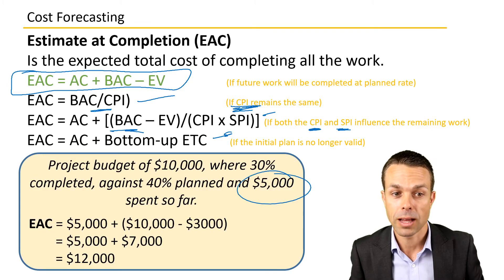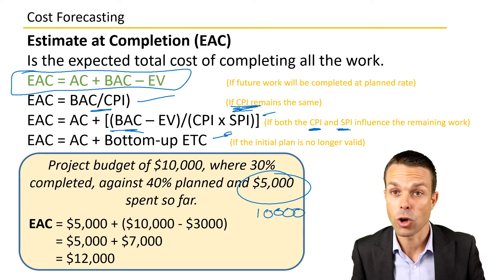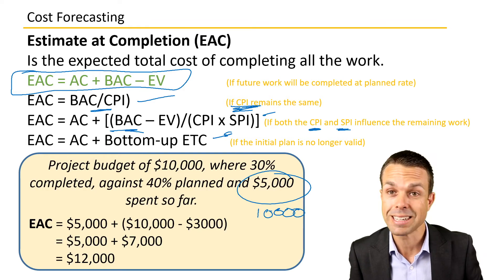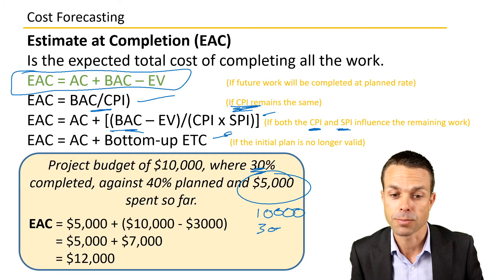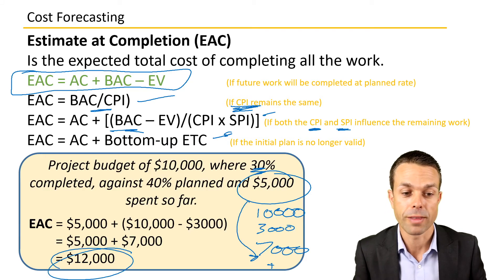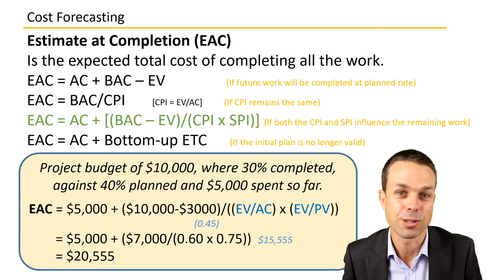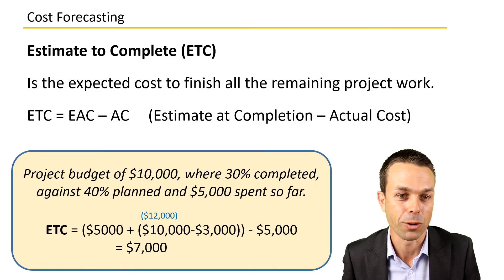For our purposes we're using the simple formula. We've got the Actual Cost of five thousand, plus the Budget at Completion of ten thousand, minus the Earned Value — which is what we've completed so far, thirty percent of ten thousand, equals three thousand. That's seven thousand plus five thousand, which equals twelve thousand dollars. So that's what we're going to use as our Estimate at Completion for this example.